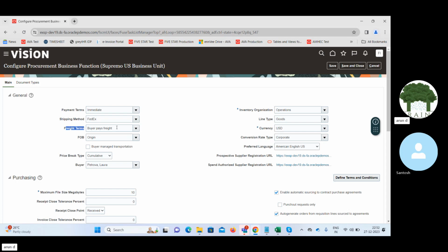But how these freight charges will happen is that they will have a monthly fee. For this particular quantity, they will basically have the stock quantity in a weighing scale, and based on that, they will charge us. On this particular date, from this location to this location, I have carried this much of goods, so for this I'll charge this amount. So we will get these freight bills from DHL. This bill will be processed as a separate purchase order, and for this purchase order we will have to make the payment. That is how it will flow through.